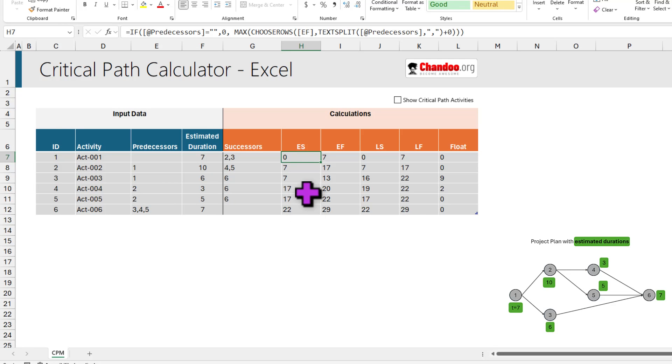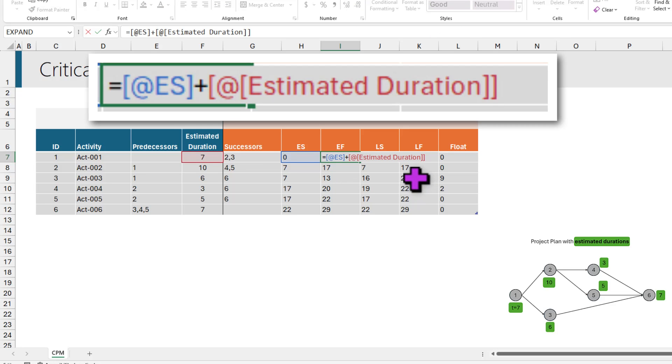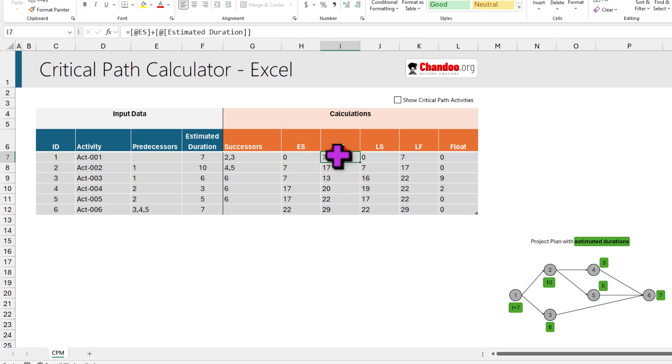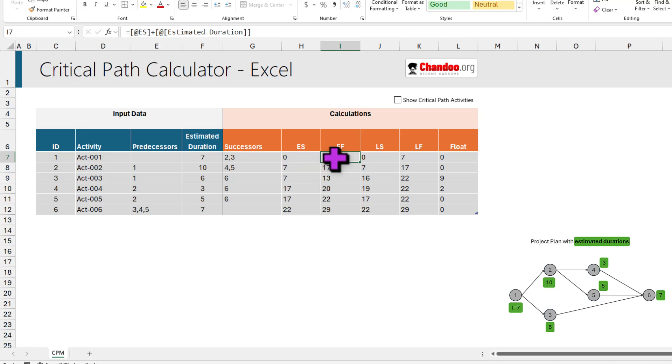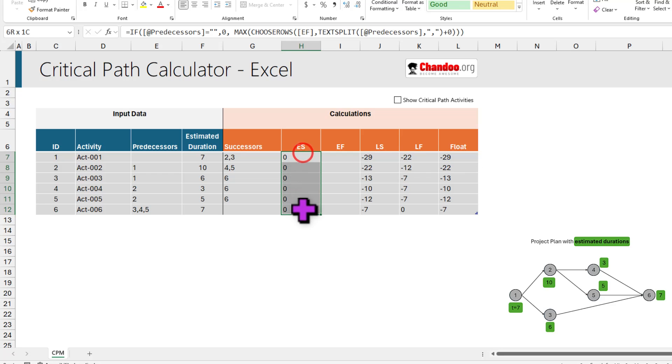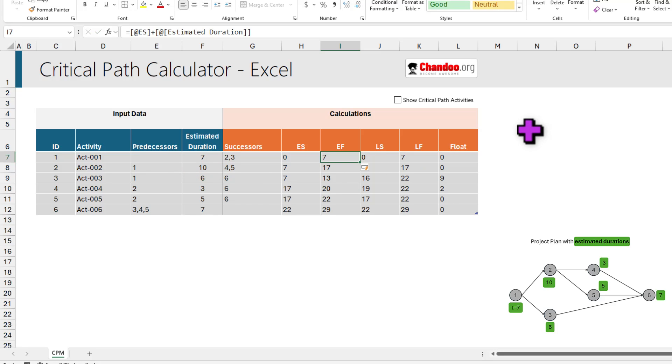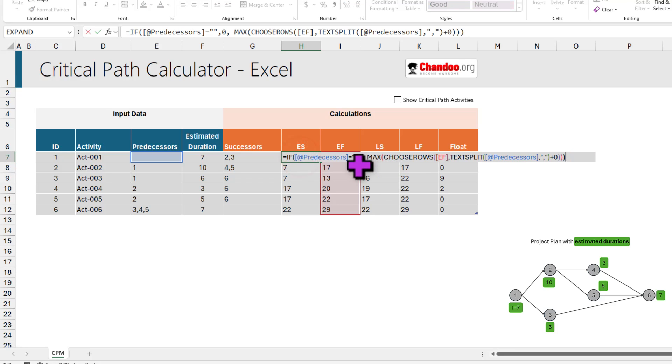So this formula, when it goes down, it will eventually calculate. But for this formula to calculate, it depends on the EF calculation. So here in EF, the calculation is whatever the earliest start that I have, plus the estimated duration. Now you might think, oh, this looks a bit dicey. This depends on that, and that depends on this. Isn't this a circular reference? Well, technically it's not a circular reference, because even though the formulas themselves depend on each other, the actual logical flow will not be like this. So for this to understand, I'm going to delete this, and then you can see that all of them can begin straight away. Now, if I say this plus that, then Excel will rearrange the calculations so that it can show me these values. This is what I mean by the formulas are a little bit complex. But once you carefully study them, you will understand those values. So this is how we do the ES and EF.